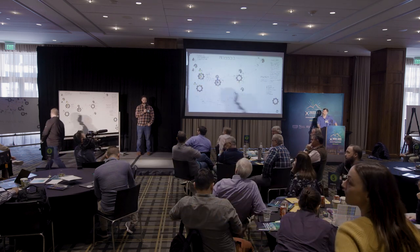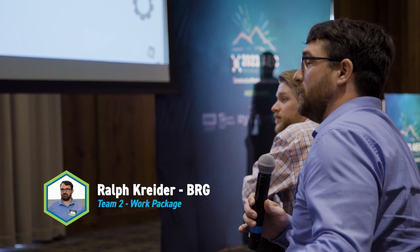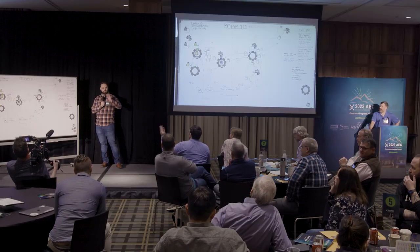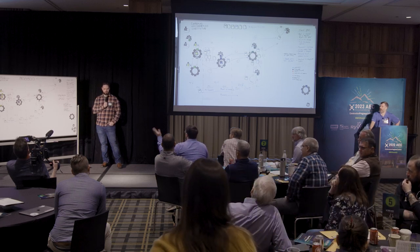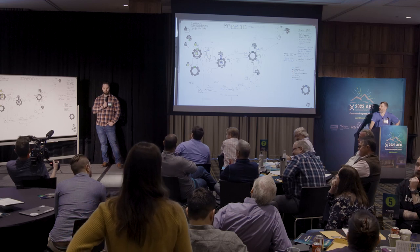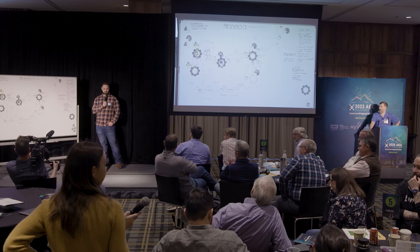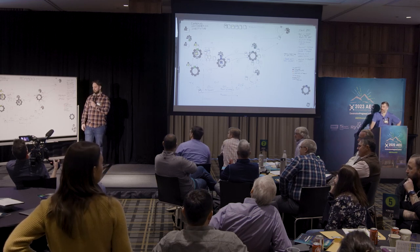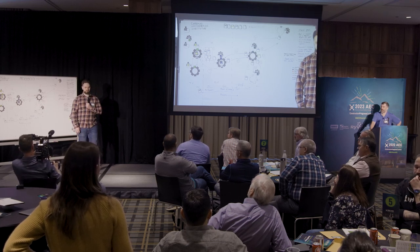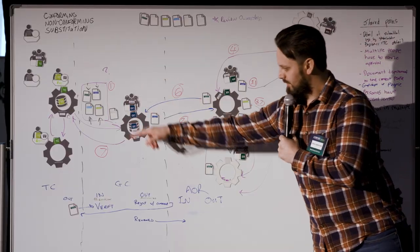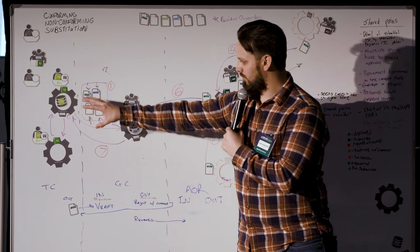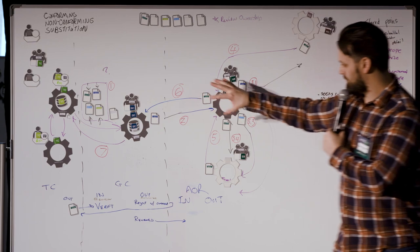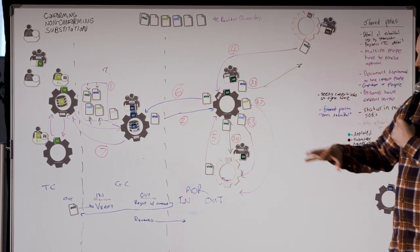Did you think about the concept of nested packages — multiple layers where a trade partner submits their piece and the GC packages that together? For example, doors and hardware: the architect wants to see it all in one package because they're interconnected, but you might have a hardware subcontractor and a door subcontractor each submitting separately. Someone has to aggregate all that together, and you can't approve one without the other — that's where the confusion comes in.